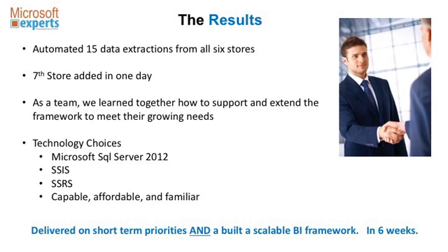So for this project, we were able to deliver on those short-term priorities. And what would be nice to show is that, as we were going through this, we created a laundry list of other ideas and other data subject areas. They have work orders and kits they call in building bikes, and all this other information they want to build in subsequent releases. As those came up, we modeled them, put them over to the side, and said, don't worry, we can see how to do this, but let's stay focused on these short-term priorities. And we were able to do that and build a scalable BI framework, and we did it in 6 weeks.